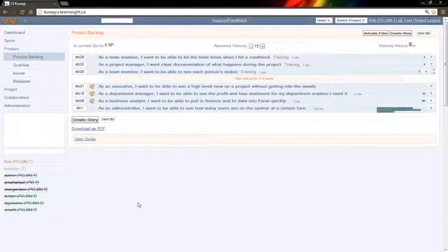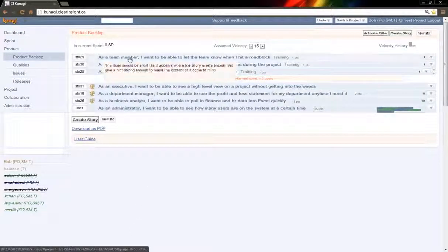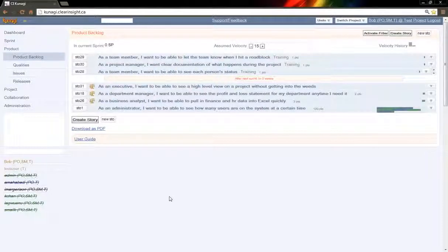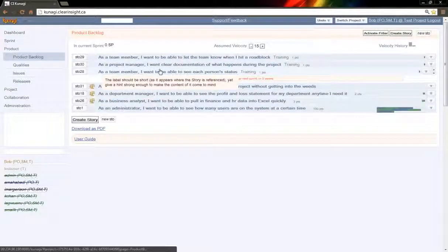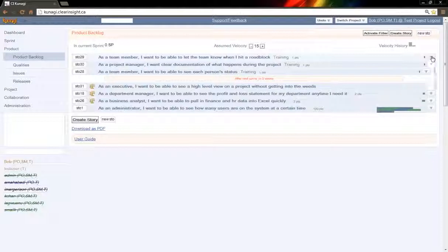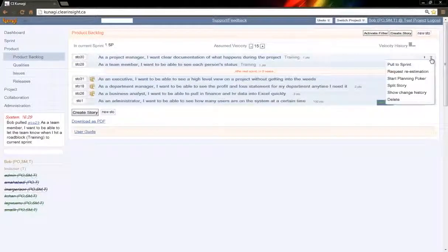When we get together for our sprint planning, we decide what we want to take on. The product owner has already moved these things around, so the ones near the top should be the ones they want to get done. So the product owner comes and says, I'd really like it if we can get these 3 things done in the next sprint. Team, what do you think? Think we can do that? And the team gets a chance to ask questions, clarify different things, put in more detail, maybe split them out, refine them, reword them. But at the end of it, we end up with a couple that have been accepted. So we really pull them into a sprint.